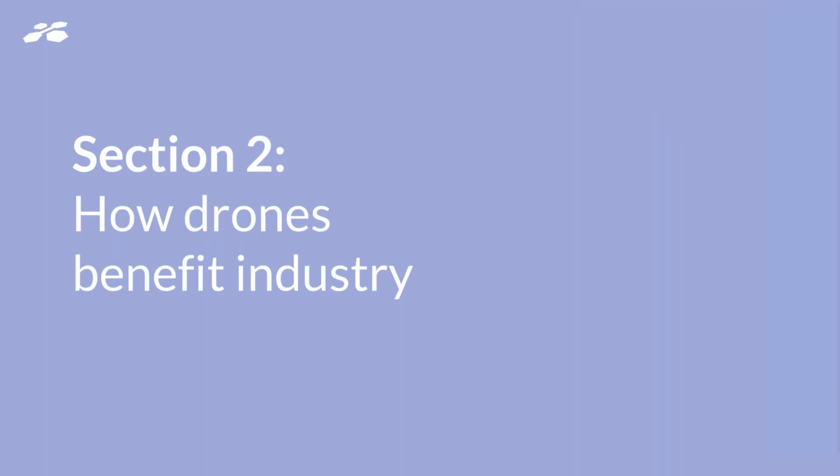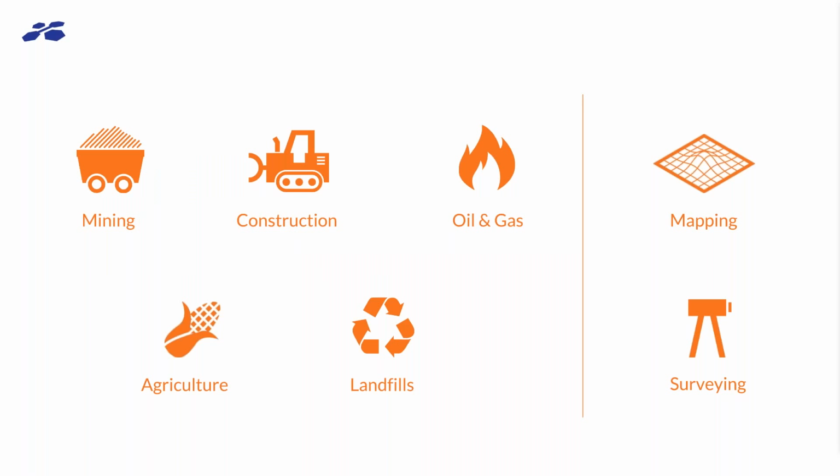So how are drones benefiting your industry? Well, if you're in mining, we're seeing drones used to capture real-time mine planning data, see how progress is being made, track the efficiency and impact of blasts, track stockpiles, look for safety issues in shelves. For construction, anything where you're moving lots of earth, any kind of horizontal construction, highways, site preparation. It's great to see exactly where you are, exactly how much progress has been made instead of just counting trucks that may be half full.